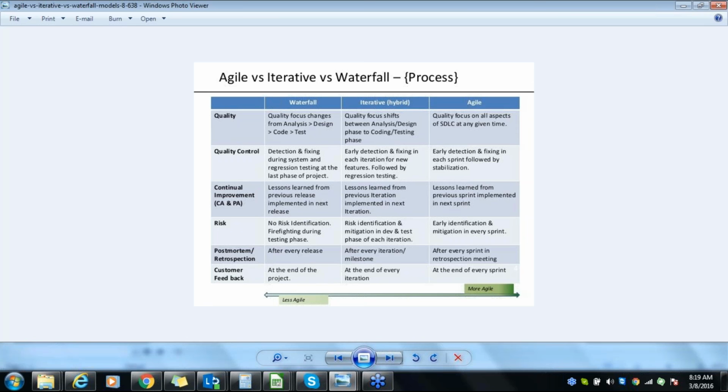If you have to develop the entire login page, it will take 2 months. That's the waterfall model. But in Agile, you will create username, password, and submit link first. Then you will add forgot password, then sign up. So you broke the complete product into 3 different cycles.